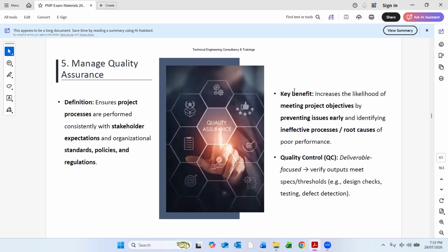That is also part of the quality checks. These non-conformance reports are usually raised on the site, and the NCR will say that this work has to be redone again.